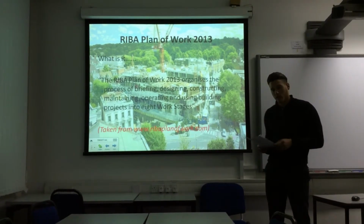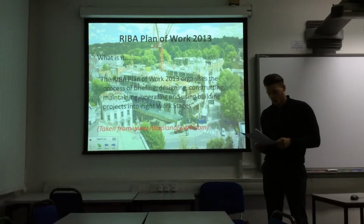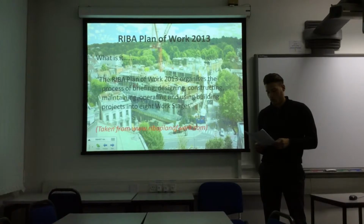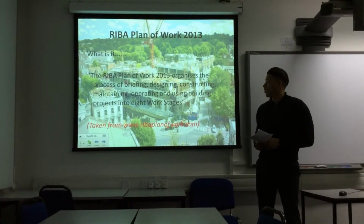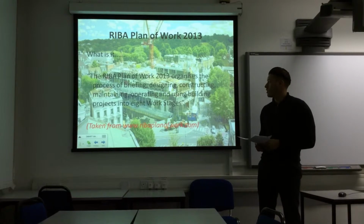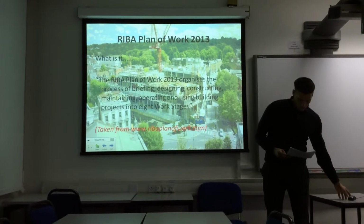The RIBA Plan of Works 2013 recognises the stages that a building project goes through and promotes the importance of recording and disseminating information about a completed project. So what is it then? It says here, the RIBA Plan of Work 2013 organises the process of briefing, designing, constructing, maintaining, operating and using building projects into 8 working stages.